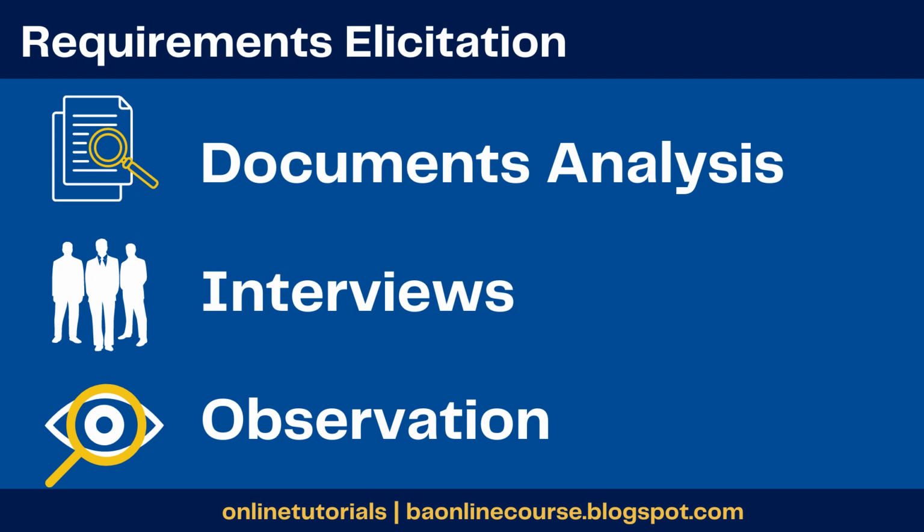Right. So I think broadly you're aware of the topic, but work on the articulation. It's not just knowing the topic, but answering it as well, right? You know that a change request comes in, then you analyze it, then you send it to the senior management, your change control board, for authorization. They would decide what to do, and then you would pass it. Unless you articulate it, you're trying to explain that, but you're not getting the right words. So work on that articulation.